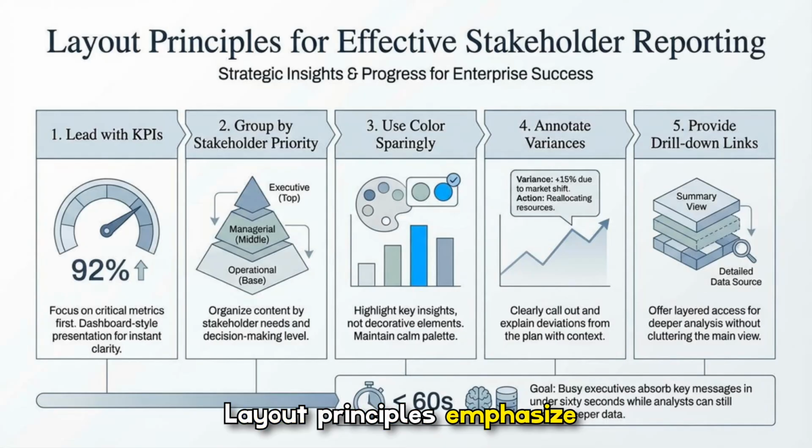Layout principles emphasize leading with KPIs, grouping content by stakeholder priority, and using color sparingly to highlight insights rather than decorate. The guidance calls for annotated variances, drill-down links for analysts, and a dashboard-style presentation so busy executives can absorb key messages in under 60 seconds, while deeper data remains accessible.